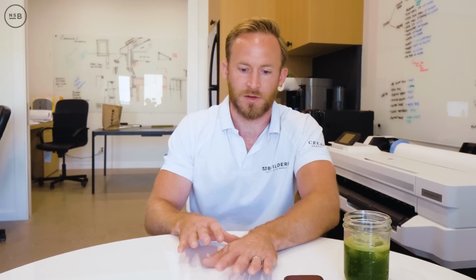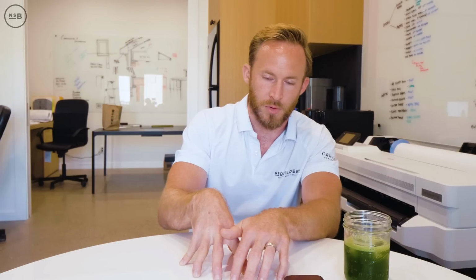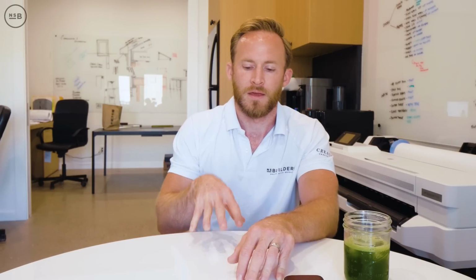We typically operate cost plus because most of our projects aren't completely defined yet. For us to commit a cost to a project is very difficult unless we have every single detail and we have provisions in there for things that might be out of our control, like site work, or maybe it's a remodel and what we find after demolition. But the way we mold them together is we work in a cost plus manner. So we're tracking our costs on a daily basis and presenting them on a monthly basis, and time and material, so contractor costs, material costs, payroll costs, and then putting our fee on top of that.